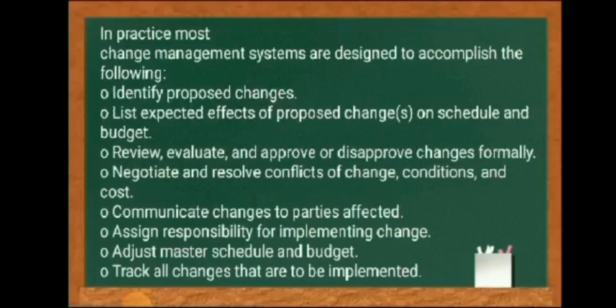formally negotiate and resolve conflicts of change, conditions, and cause, communicate changes to parties affected, assign responsibility for implementing change, adjust master schedule and budget, and track all changes that are to be implemented.